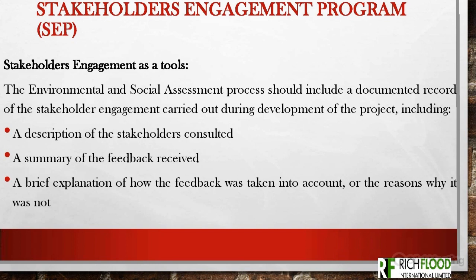Now, when we say stakeholder engagement as a tool, what do we mean by that? EIA process should include a documented record of the stakeholders' engagement carried out during the development of the project. During consultations from time to time, right from the beginning of the project up until the commissioning phase and the rehabilitation phase of the project, consultations will keep going with these stakeholders. And everything being discussed at each meeting should be documented. That is when stakeholder engagement program becomes a tool in EIA. Because without documentation, it has no part to play.